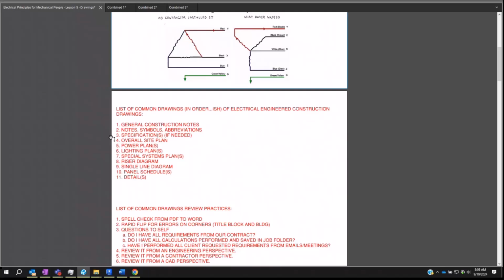So sometimes they show up on sheets, on the actual sheets in the drawings, which are very high level. And then sometimes there's what's called book specs, which is the standard 8.5 by 11, nothing but words, nothing but text. There's typically no pictures. The wastewater treatment plants I used to work on, I would have 800 to 1,000 pages of book specs just for electrical.